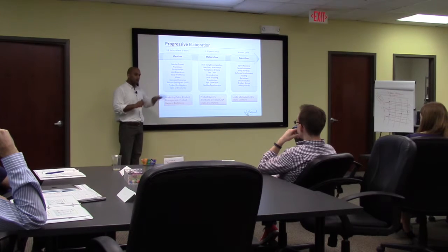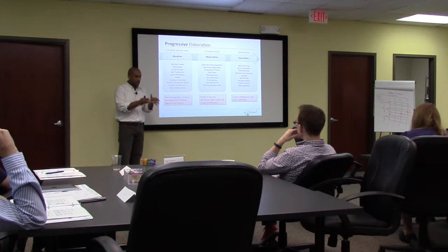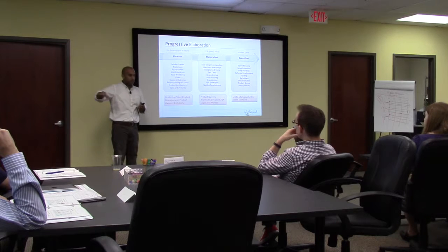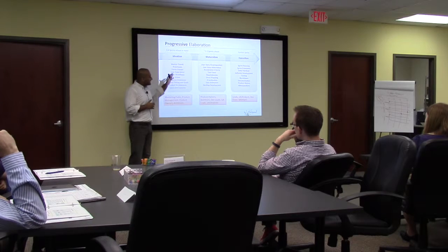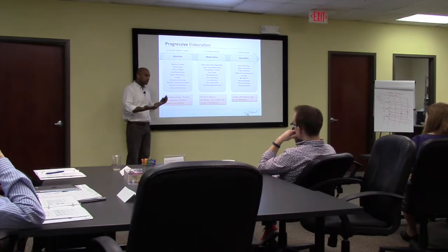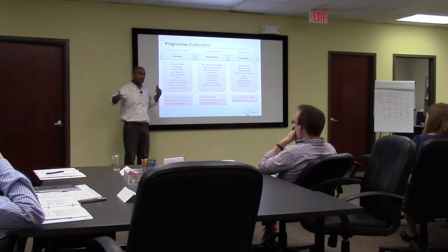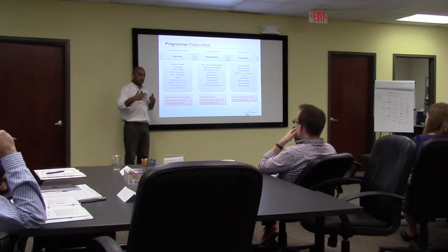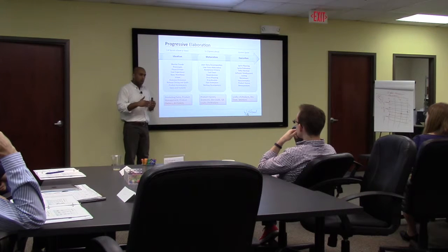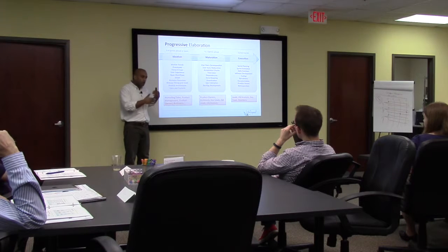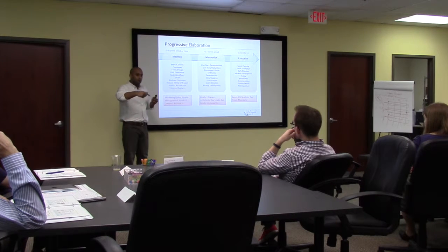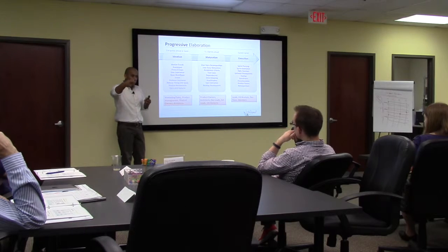This is how you balance your focus between putting all your time and effort in focusing on the current time box, which is the current sprint, and building a realistic line of sight over a period of time. So it's important to piecemeal your effort this way. There's only so much you can refine over time. So don't kill yourself trying to get all the details for the entire 12-month project, but at least try to shoot for a specific plan for maybe 1 or 2 sprints, and then 3 or 4 sprints down the road, get a high-level realistic projection. And as you go through your sprints, you will continuously buffer out time to refine your backlog.